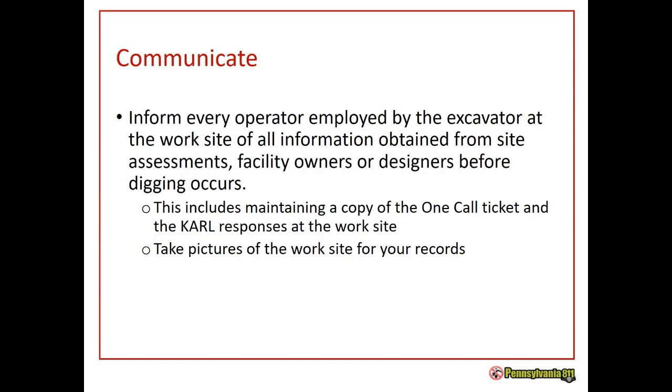And what you see a lot of the time is the people that brought the most information are able to back up their stories. So you want to make sure you're taking pictures of your work site for your records, just in case something comes up later. And make sure you're taking those pictures from places where you can see perspective. If it's right overhead, just looking straight down at the ground, well, there's no way of telling how far away that was from this or how far away that was from that or what direction you were looking. So make sure you are properly documenting your work site.